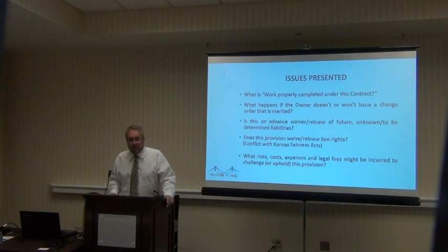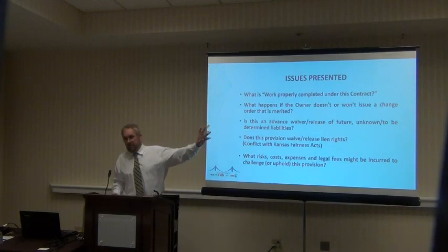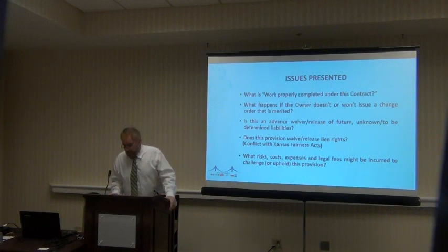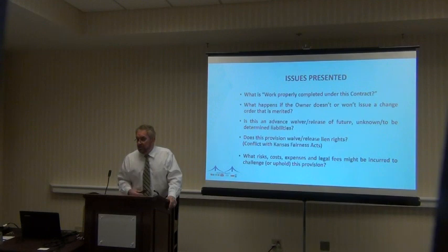But that's a good question, and the distinction I would draw is that you're asking about a limitation of liability. This is an exclusion of liability. Limitations are somewhat reluctantly, but still upheld. Exclusions are very disfavored. Good question. Additional thoughts?